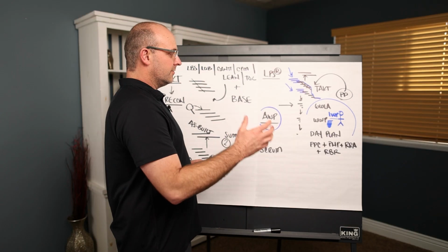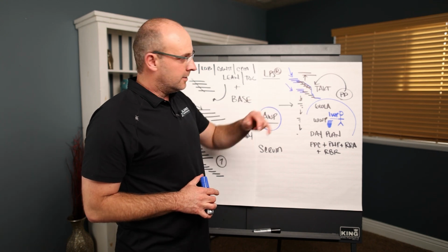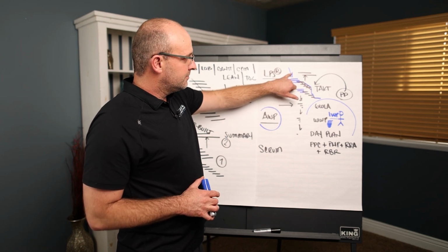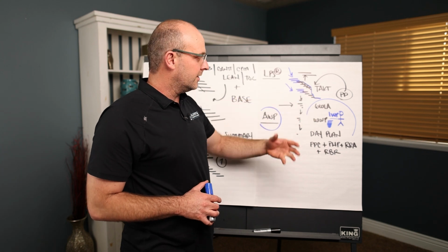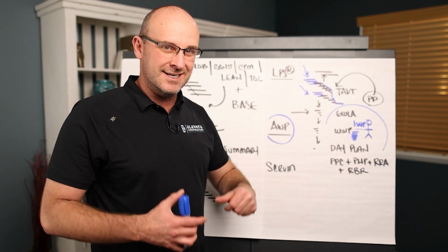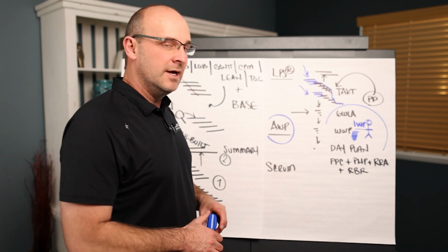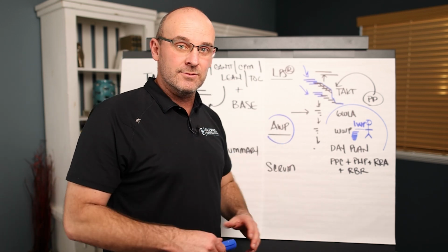And so if you want to take advanced work packaging and put it on the system, then you'll align the supply chain, use building information modeling, understand the path of construction and the right work areas, and you'll prepare work packages to really enable the trades to have as little downtime as possible. No, get rid of tool time, as little downtime as possible.